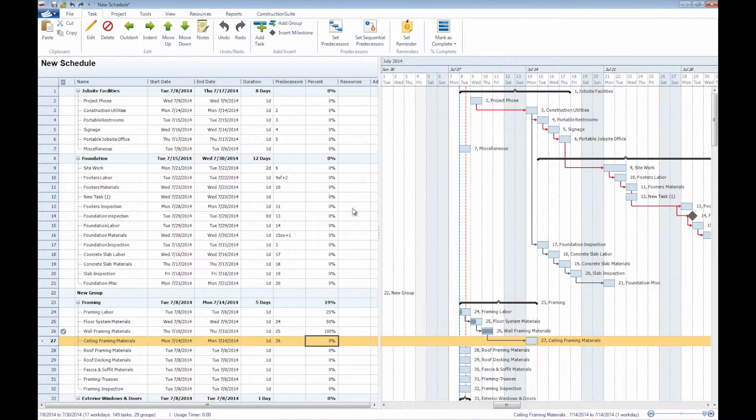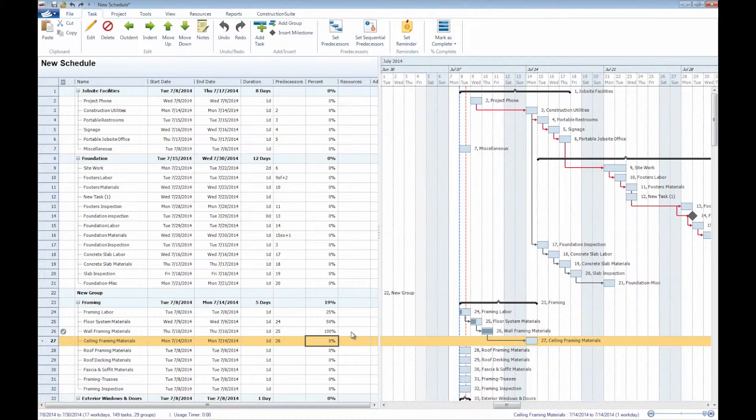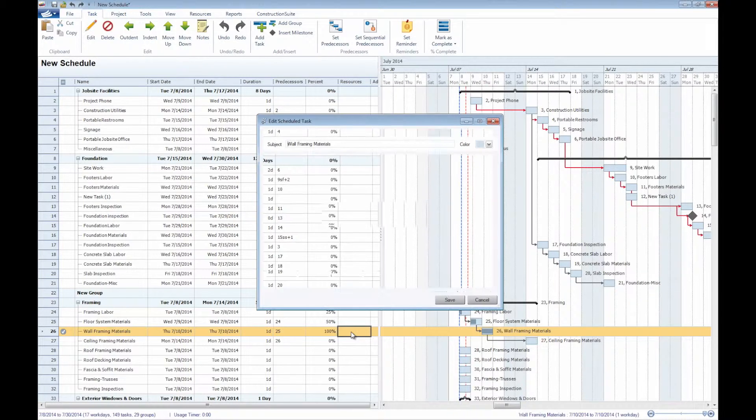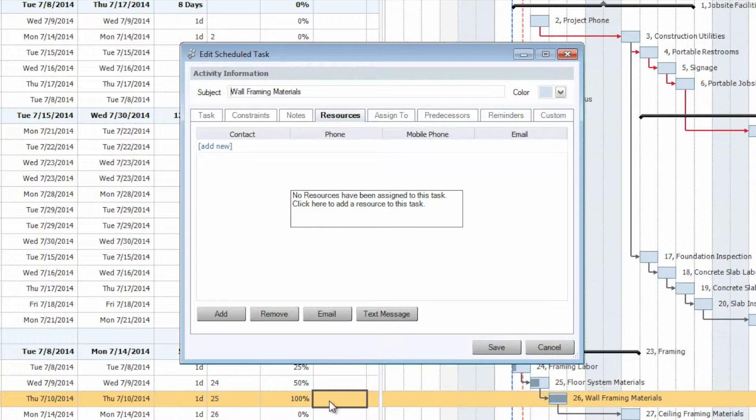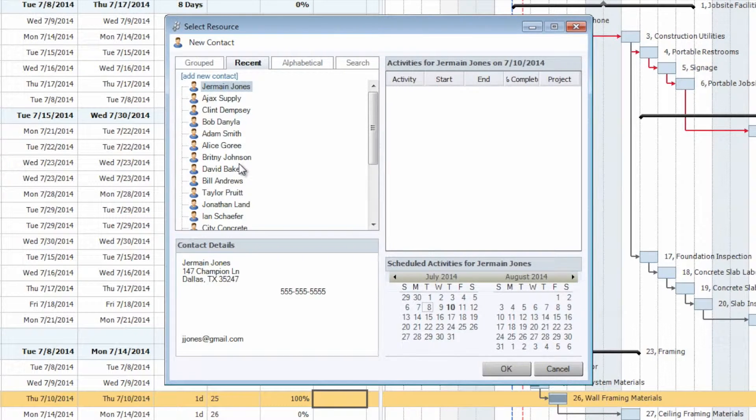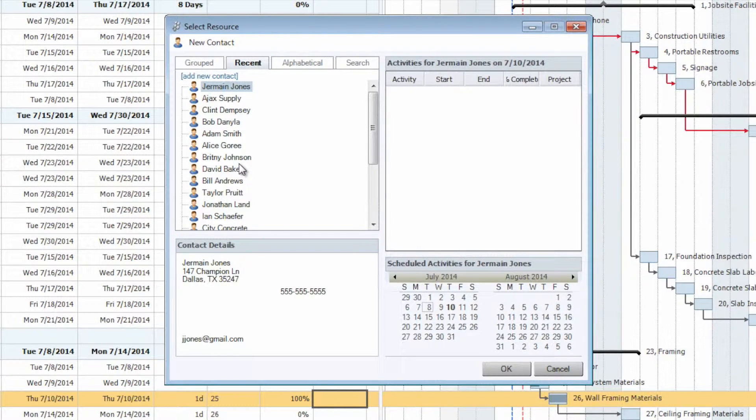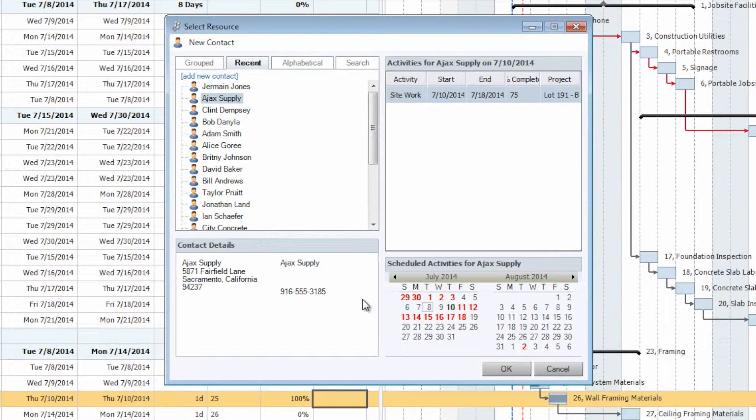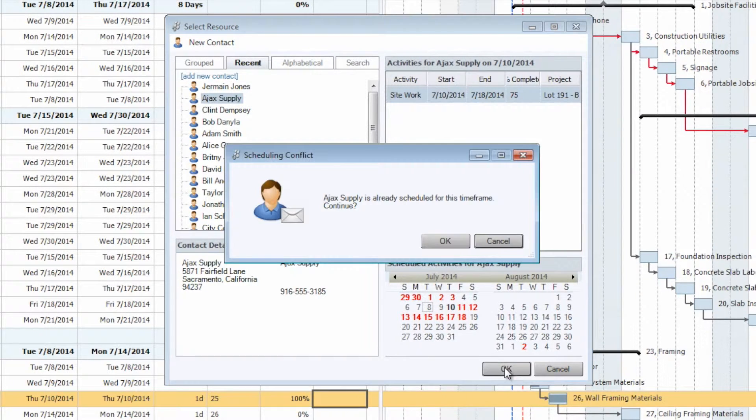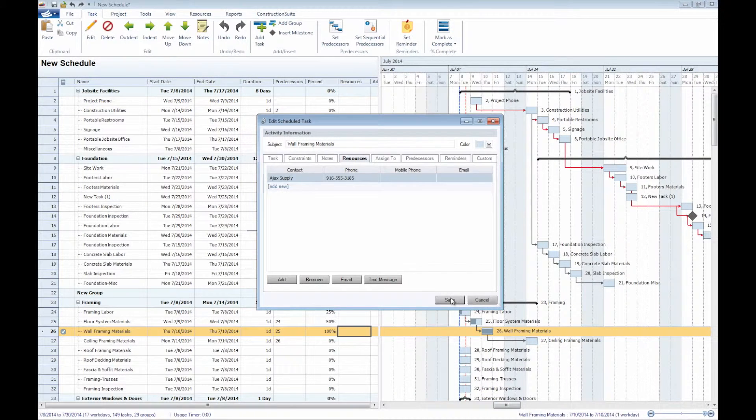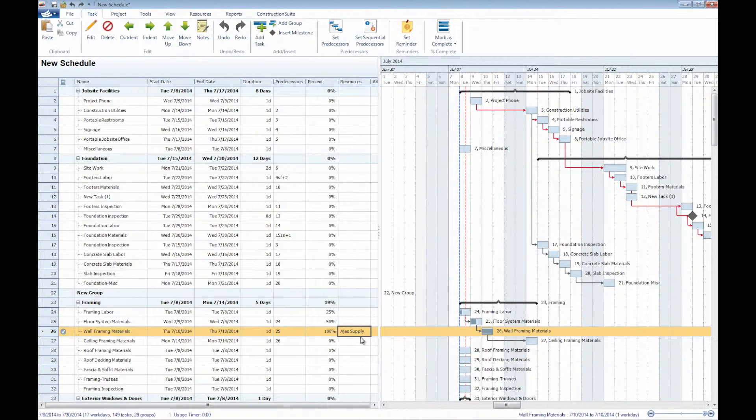We also have the ability to assign resources to our individual tasks here. By simply clicking within the column, within the cell, the task that you want to assign a resource to, that will bring up the resources window here, where we can go ahead and add a new contact. That's going to bring up our select resources window, at which point we certainly go through, say we wanted to add Ajax Supply as the resource for this individual, for this wall framing materials task here. Select OK. And by saving, we'll notice that Ajax Supply has now been assigned as a resource to this individual task.